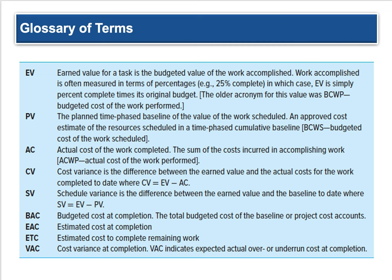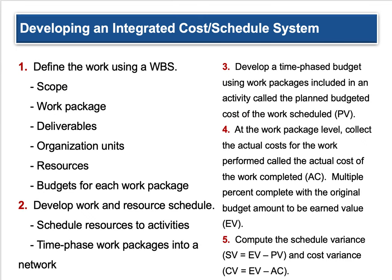With all this in mind, we can develop an integrated cost and schedule system. It goes back to defining the work in the Work Breakdown Structure — the scope of your project, work packages, deliverables, organizational units, resources, and budgets for each work package. We develop a work and resource schedule: the WBS leads into the schedule, scheduling activities and resources, then time-phasing work into the network gives you a Gantt chart. Develop a time-phased budget and you get a cash flow. Remember the WBS had lag time built in, with costs broken down by individual units, then added up into a budget.